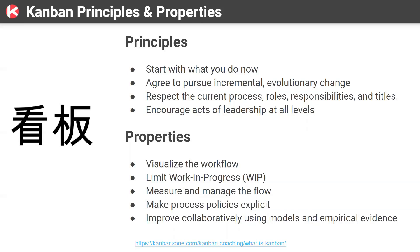Fourth: making the process explicit. As you build your Kanban board, you're going to naturally add what I call a definition of done for each column — clearly stating what it means for a card to be completed in a specific column before you can move it to a new column. This is very powerful: when someone joins your team, everything they need to know to function is explicitly stated on the board, which means we can onboard people extremely fast in a Kanban environment.